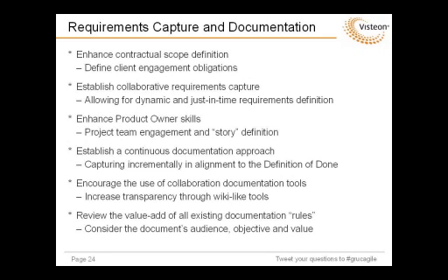This meant that we managed to get a greater real-time engagement with the client through the product owner role. If we don't have the real client playing product owner, our own people in Visteon were better placed to play that proxy role and make sure that we get a better just-in-time capture of what's truly required today as opposed to what was speculated some months ago.